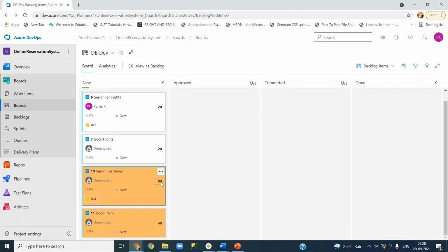If someone came and asked me in the middle of the sprint to add additional functionality that had to be delivered in the sprint itself, the project manager doesn't accept it in those companies. They simply say, I don't have the capacity to work on it, so I cannot deliver it. He simply rejects it, but he will also explore another option.